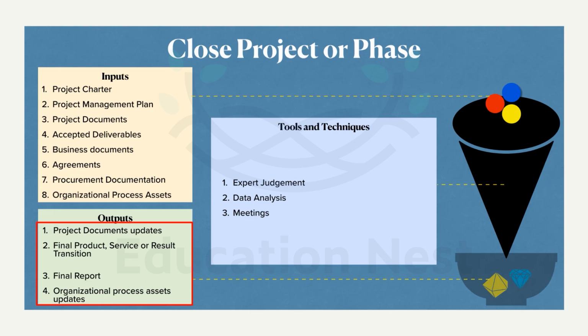What does it contain? The final report contains firstly a summary description of the project, right? It has objectives versus deliverables. What objectives are we talking about? The scope objectives versus scope deliverables, the cost objectives versus cost deliverables, the quality objectives versus quality deliverables. The final report could also have validation results, and the scheduled plan versus the actual plan. A description of the final product is also available here, right? And also the summary of risks associated with the product. When you're using a product, what risks are involved with it?